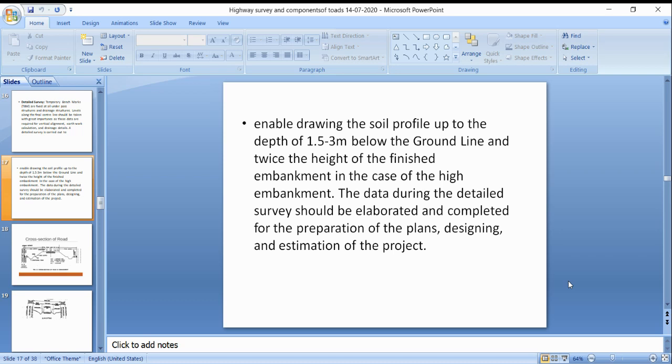Then draft specifications. The detailed specifications regarding the construction of the roads will be given, and for the bridges also we have to give the specification in detail. Then detailed estimations are to be prepared for the roads, bridges and culverts which are proposed. And for cost estimates, the cost of the entire project is to be prepared and given to the works in the road project.